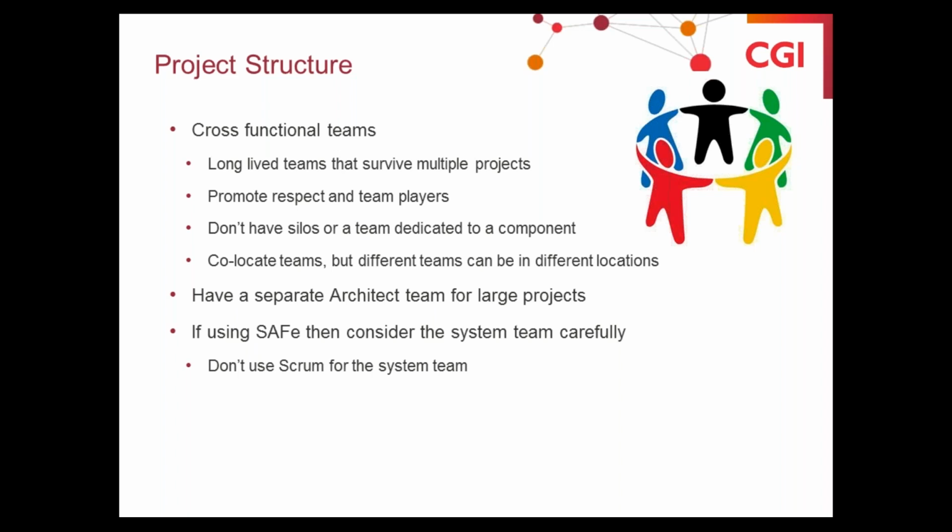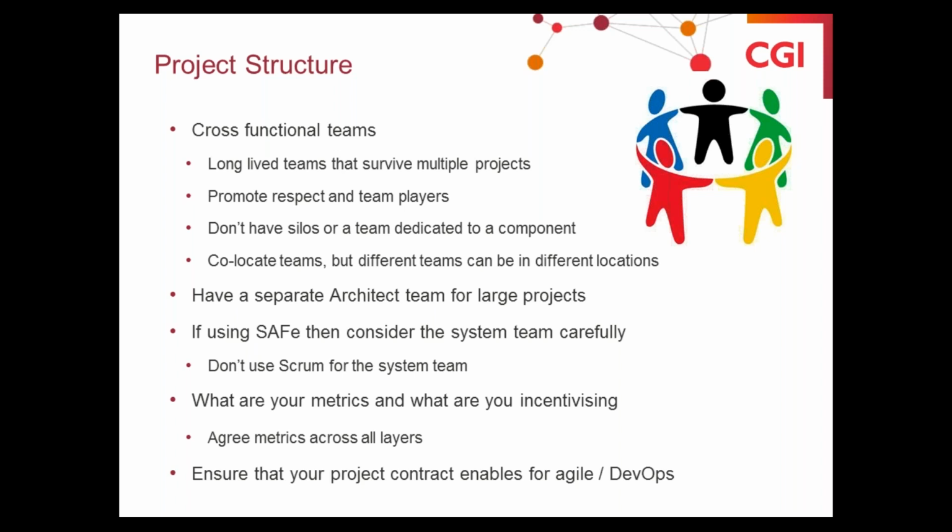But like a lot of teams where they're doing a lot of support work, a lot of unplanned work, then Scrum probably isn't, in my opinion, a good agile approach for that. Something like Kanban, where you can react more quickly. With Scrum, you're trying to protect the sprint and trying to have known work. If most of your work is intentionally unplanned, then it's hard to use Scrum.